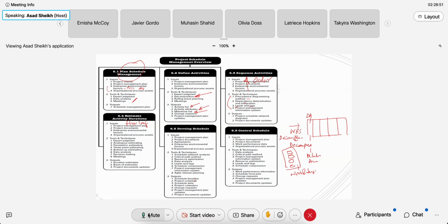You are warm. So if you're building a house, keep the house in mind. It helps you understand this. So if you're building the house, you need the WBS of the house, right? Yes. So the WBS of the house at the highest level is all deliverables, right? These are deliverables right here. What are deliverables? Electrician. I need electrical work. I need plumbing work. I need framework. I need the roofing. And interior work, right? Those are your deliverables, big blocks of work. And that's what you have in your WBS.